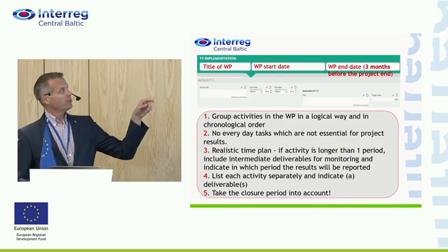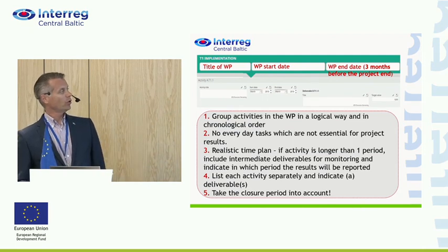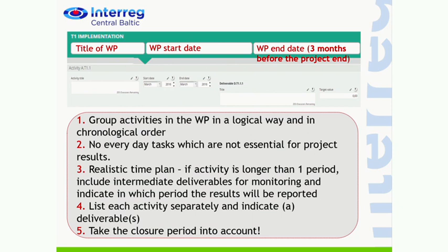Yes, and of course you will remember very little of these things when you start filling in the application form. So get back to us and go to the guidance and read it, and in the end everything will be fine. So here is just the same case described again, and a little bit about the activities. They should be in a chronological order, and they should be the main things that you do in the project. So not just the everyday tasks, such as filling in the worksheets, is not an activity that you need to put in here.